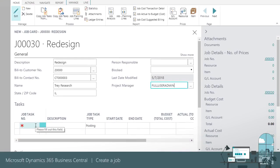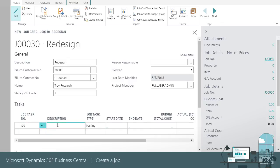Now we'll create tasks. Typically, the job task number is part of a number sequence that we define. We'll keep it simple and use 100, 200, and so on. The description lets us add information about the task.